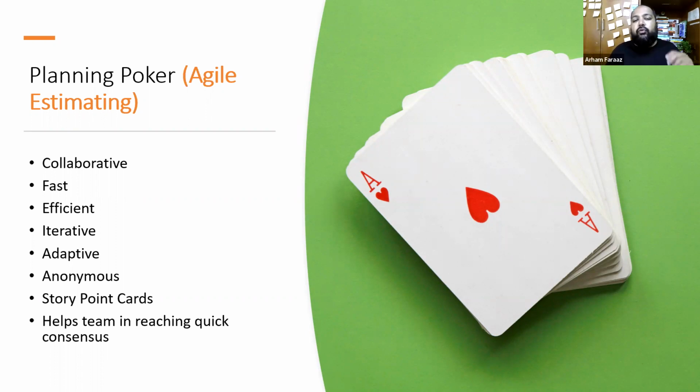So let's say 2 developers put 8 story points, one developer puts 5 story points, and another one puts 3 story points. Once they have put these numbers, we turn the cards and see 8, 5, 3, and 8, right? Now there will be a discussion. People ask, why did you put 8 points? What is the justification? And we ask, why do you think you can do it in 3 story points? Is it a very senior developer who's doing it? Or, why do you do it in 5 points? So we always move towards the higher estimate and the majority. Whoever is working on it will decide on, let's say, 8 story points. That's the advantage of planning poker.